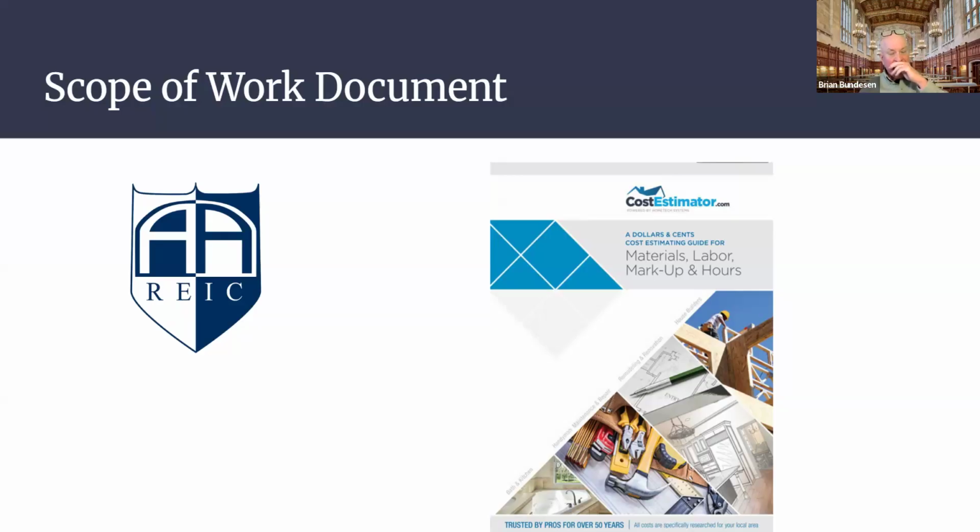And guess what happens? You likely have had this happen to you before. The contractor gives you a number, you sign the contract, you go in there, floors are torn out, walls are torn down to the studs. The contractor says, oh, gee, I didn't think about this. This is going to cost you more because of X, Y, and Z. Guess what? He's got you on the hook. So what are you going to do? He's now holding you hostage, and he has the leverage over you.